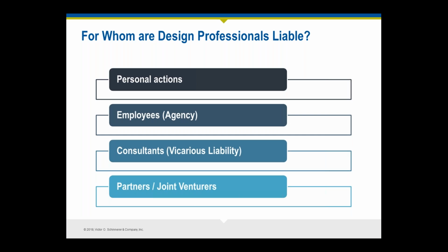Well, again, who's going to be stuck paying that extra $200,000 to the client? It's going to be you as the prime designer. And so you don't want to be in a position where you contractually limit your subconsultant, but you don't have any kind of limitation with your client. And that could even result in issues of insurability. It's just a bad road to go down. So you want to make sure that all of your agreements and the subconsulting agreements are coordinated.